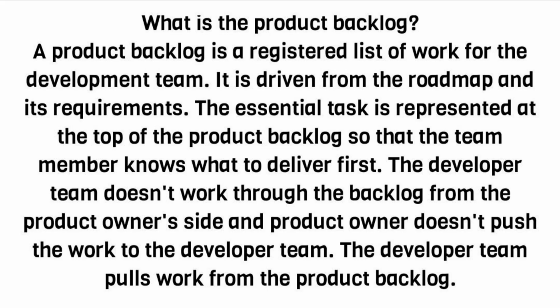What is the product backlog? A product backlog is a registered list of work for the development team. It is derived from the roadmap and its requirements. The essential tasks are placed at the top of the product backlog so that team members know what to deliver first. The developer team doesn't work through the backlog from the product owner's side, and the product owner doesn't push the work to the developer team. The developer team pulls work from the product backlog.